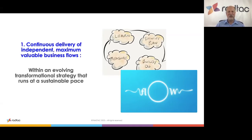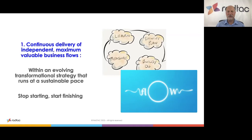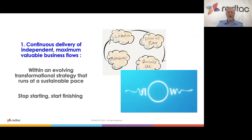We need buy-in from senior management that not everything fires off left, front, and center when the transformation starts gaining momentum. We want viral change, but done in a manageable, realistic way so the transformation sticks. The last key point — from Kanban: stop starting, start finishing. It's so easy to fire up eight million things at the same time — like the 96 objectives from British Airways. What we really want is to start something, finish it, then start the next thing. The more we have running at the same time, the more likely we are to confuse people.